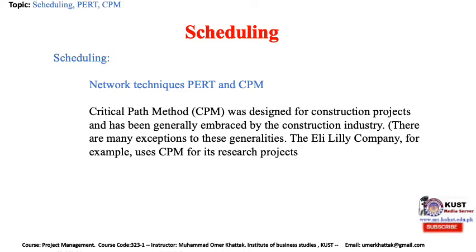For almost half a century, PERT and CPM networks have been used in project management. However, in 2005, the PMI — Project Management Institute — renamed PERT as ADM, Arrow Diagram Method, and CPM as PDM, Precedence Diagram Method. In general, we simply refer to either as a network. If we wish to refer specifically to a PERT or ADM network, where the activities are shown as arrows on the network, we will call it AOA — activity on arrow network. And if we refer to a CPM network, where the activities are shown as nodes, we will call it AON — activity on node network.